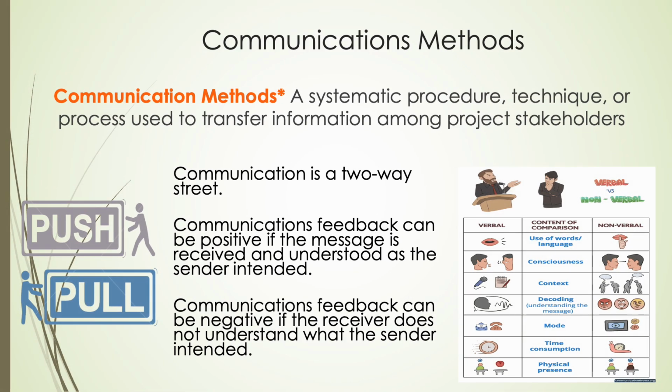Communication methods refer to how information is delivered and received among individuals or groups. They can be categorized mainly into push and pull communication. In push communication, the sender actively delivers the information to the receiver, often without waiting for immediate feedback. Examples include emails, memos, and press releases. In pull communication, information is made available for the receiver to access at their convenience, such as through websites, knowledge bases, or notice boards. Selecting the right method is crucial depending on the urgency, audience, and nature of the message.